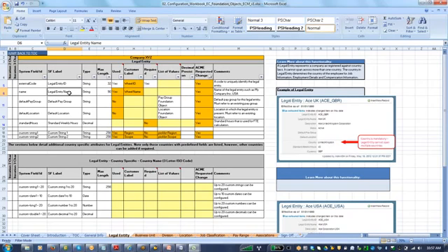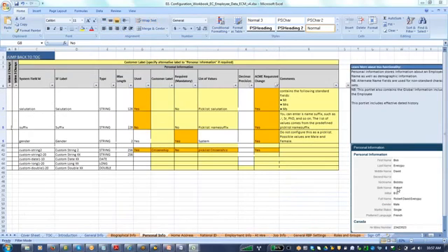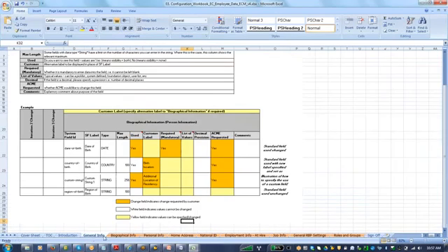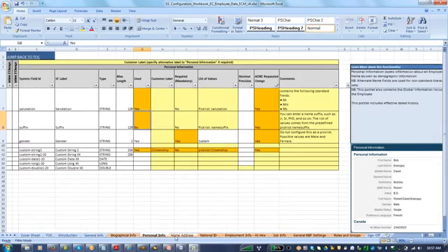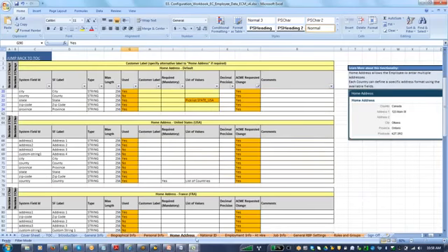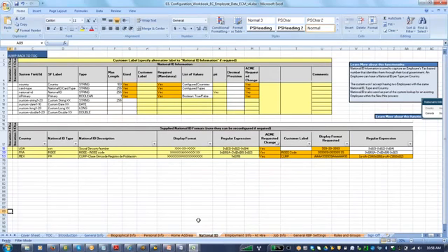Once that is done, the foundation thing is done. And likewise do it for the employee data as well. There is another spreadsheet, another piece of work I have, that's what I was telling. There is this order: general information, biographical information, personal information. All this order needs to be maintained properly, and that is mentioned in the implementation guide. There are 6 steps, the 6 order which is mentioned there for uploading or downloading the data. So you need to capture country-wise whatever is relevant.